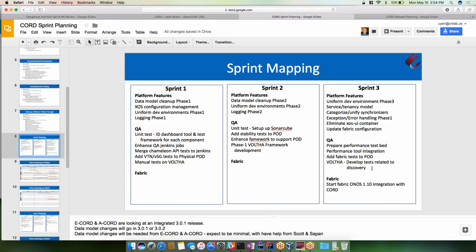Yeah. But that's just related to Volta and nothing else, or maybe the ONOS apps that work with Volta. Okay. But Volta has to be integrated into Cord as well, right? Yeah. So that's something that we will do in the coming weeks. The problem with that is that we don't have hardware to run against Volta. So we're trying to get the emulator. That's what Shad is working on right now. And if we can, then we can go ahead with trying to integrate Volta into Cord, residential Cord.